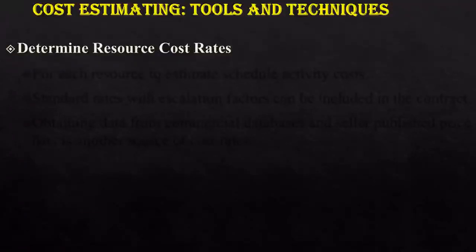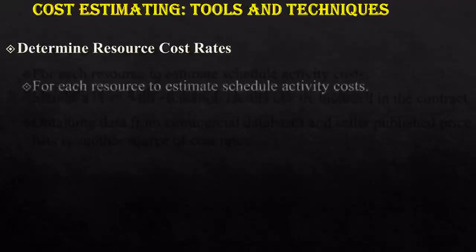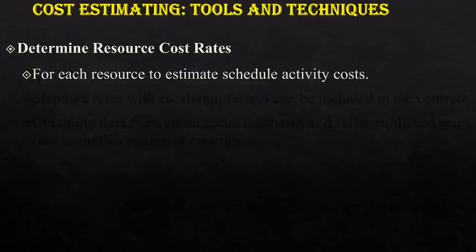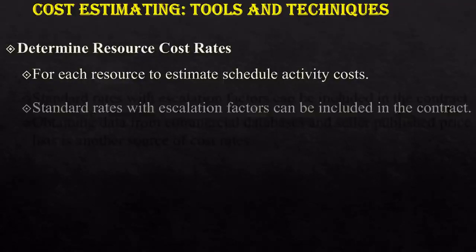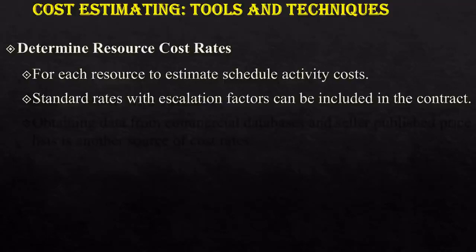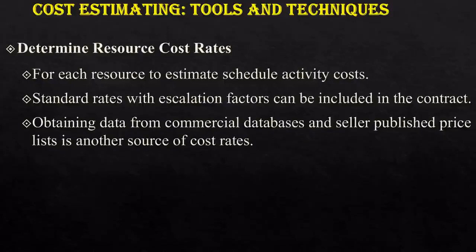Now, determination of resource cost rates — how can you determine the cost rate of resources? For each resource to estimate schedule activity cost, resources may be men, material, machine, money, etc. Standard rates with escalation factors can be included in the contract. Obtaining data from commercial databases and seller-published price lists is another source of cost rates. You can get cost rates from governmental databases or published seller price lists.